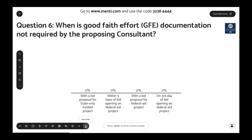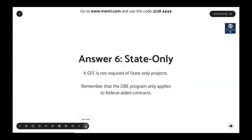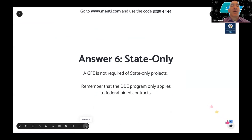Question six: when is good faith effort documentation not required by the proposing consultant? Choices are: with a bid proposal for state-only funded projects; within five days of bid opening on a federal aid project; with a bid proposal for a federal aid project; or on the third day of bid opening. The correct answer is state-only funded projects. A good faith effort is not required on state-only projects because the DBE goal is only required on federally aided contracts.